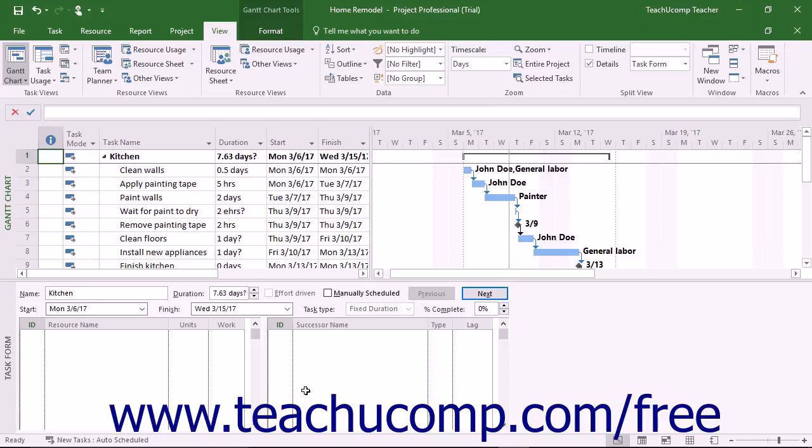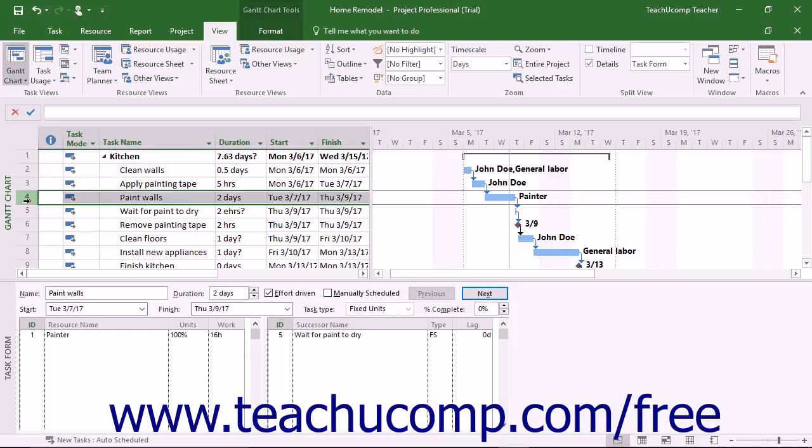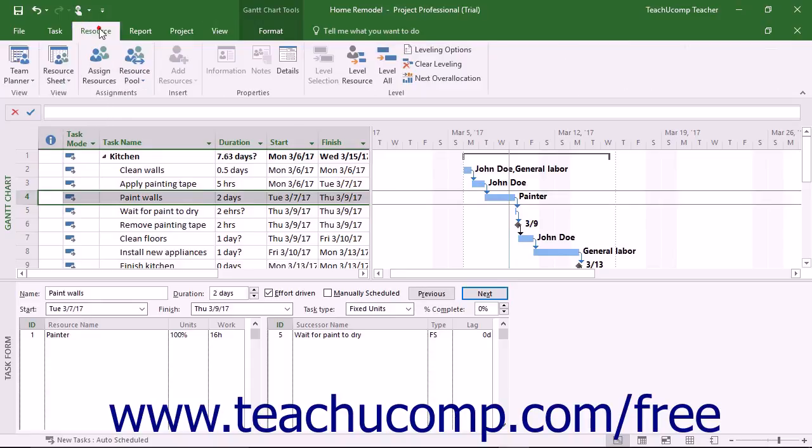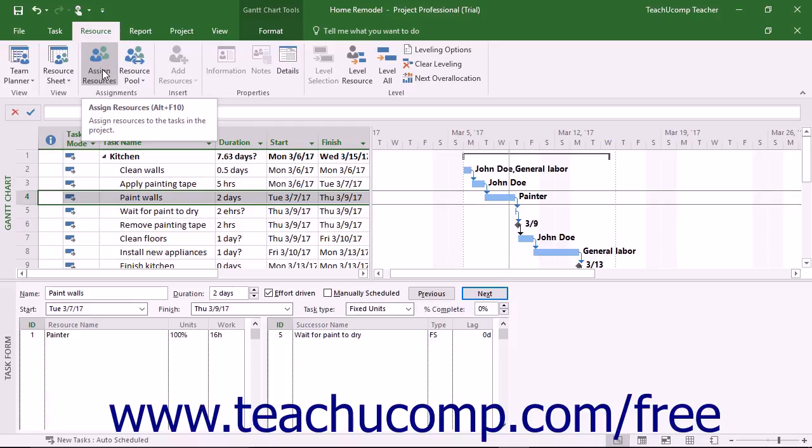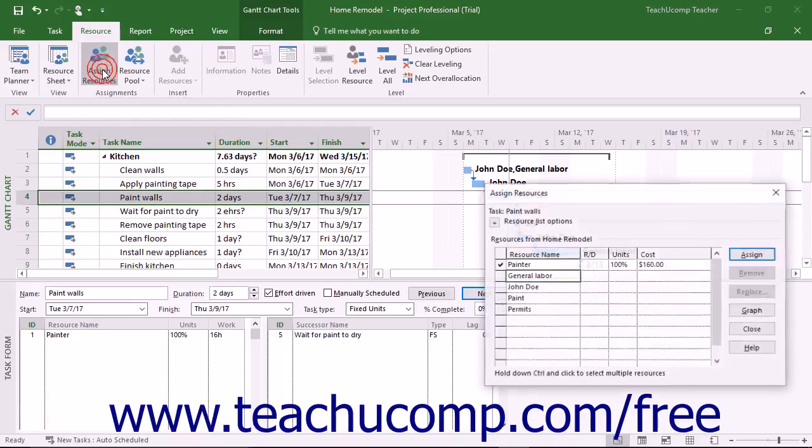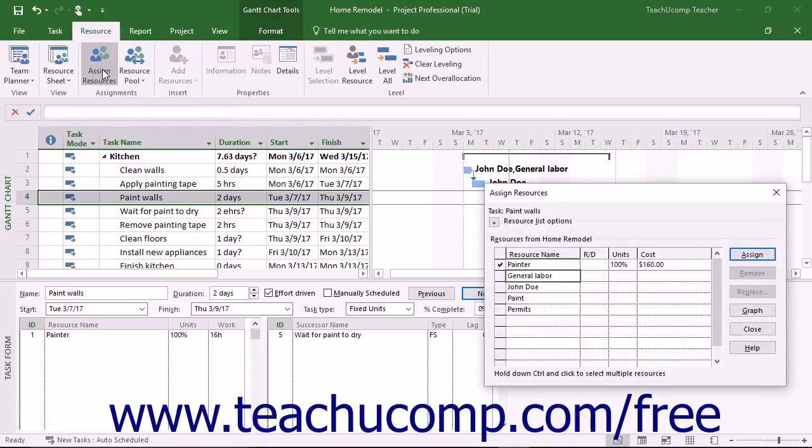You can open the Assign Resources dialog box by selecting the task in the Gantt chart view to which you want to assign the use of material resources. Then either click the Assign Resources button that appears in the Assignments button group on the Resource tab in the ribbon, or press Alt plus F10 keys on your keyboard.